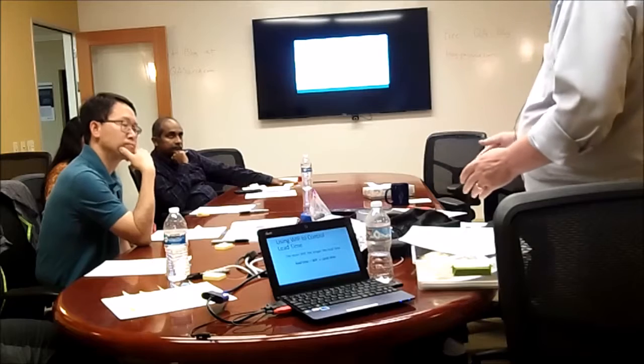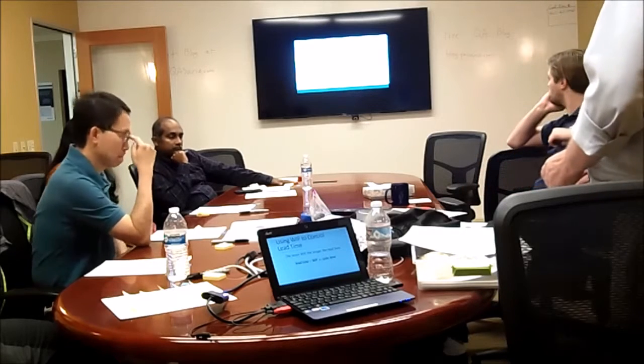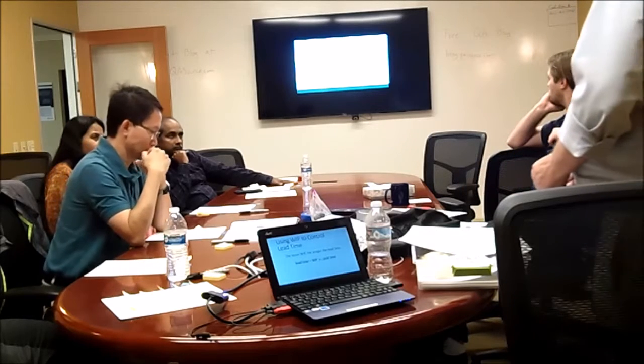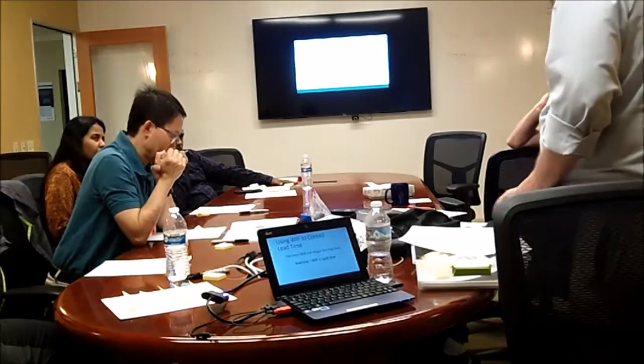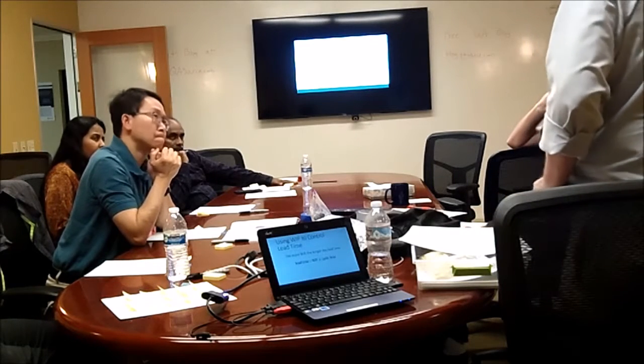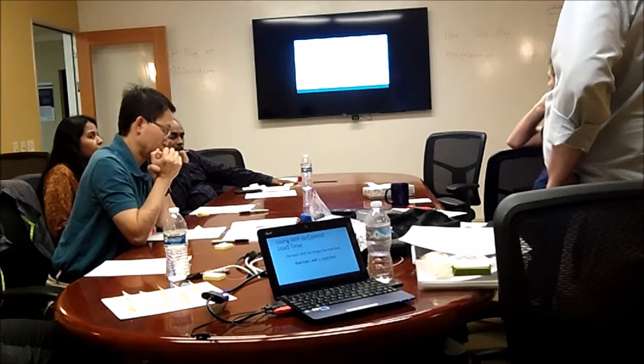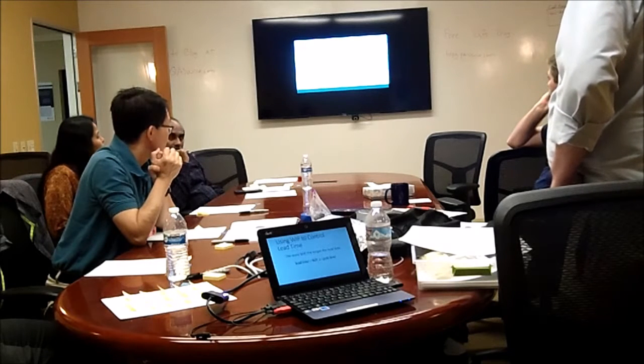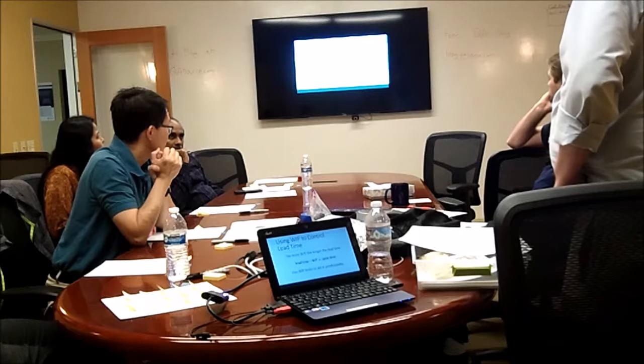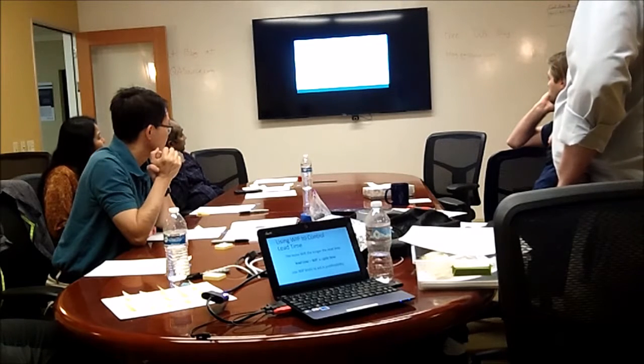Yes. The cycle time is always the same for a stable system. And the lead time depends on that and the number of units of work in process, and that's it. It's that simple. So you can use WIP limits to aid in predicting schedule.